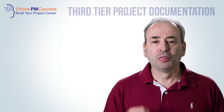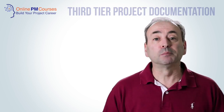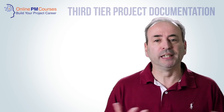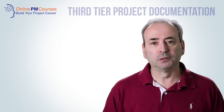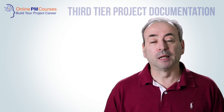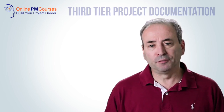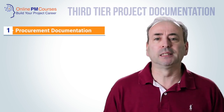Let's move on to the final third tier deliverables that I would expect on a larger project. Everything below this third tier is going to be very much discretionary and based on the nature of your project. But these 5 third tier things I would start to expect as the project gets even bigger. And so for large projects, I'd be very surprised if I didn't see all or most at least of these 5 deliverables. And the first one is procurement documentation, because as the project gets larger, you need to buy stuff.